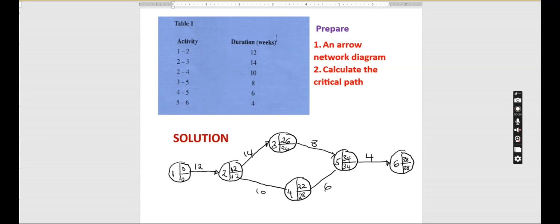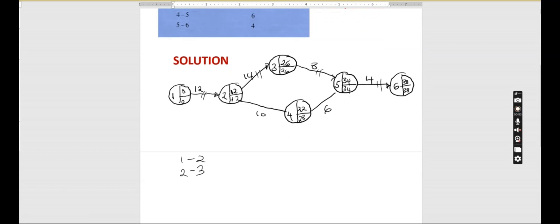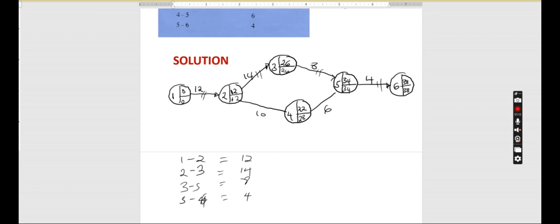So the critical path is this part here. Now let's list down the critical path we are going to follow. We have 1 to 2, then 2 to 3, then 3 to 5, and then 5 to 6. Activity 1 to 2 is 12 weeks, 2 to 3 is 14 weeks, 3 to 5 is 8 weeks, and 5 to 6 is 4 weeks.